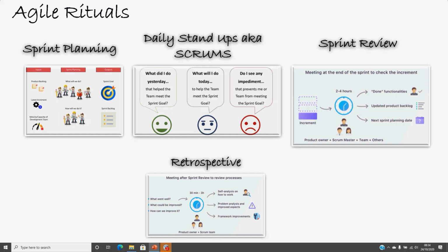So as a team, you review the scope of the work, your priorities, and what you believe is achievable during that particular sprint, and then you go ahead. So basically, they are going to the product backlog. From the product backlog, they just say that okay, I will take user story 1, 2, 5, and 7. They pull it into their sprint backlog, and then they start working upon that. So that's why they call it sprint planning, because they plan for their next sprint in that.